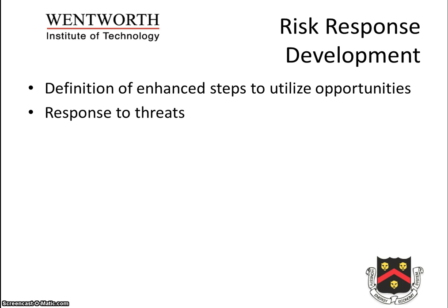The first is avoidance, which has to do with eliminating a threat by eliminating the cause. All risks cannot be eliminated, but certain ones can often be eliminated. The second is mitigation, which deals with reducing the expected cost of a risk event by reducing the occurrence probability, buying insurance, and using proven technology. And the third is acceptance, which deals with acknowledging the occurrence of a risk and developing a plan to tackle the risk in cases when it occurs.